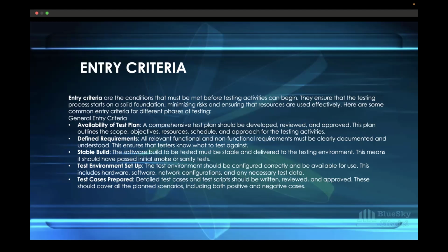And before you test as well, you need to have your test cases prepared. So most of the time we advise there is something called shift left testing, which is testing early in the life cycle. Once your developers are developing the application, you don't have to wait for them to finish developing the application or to finish working on the PBI before you start writing your test cases. Once they're in the process of developing, you use the requirement that has been given to you, the acceptance criteria, to write your test cases, to prepare your test cases.